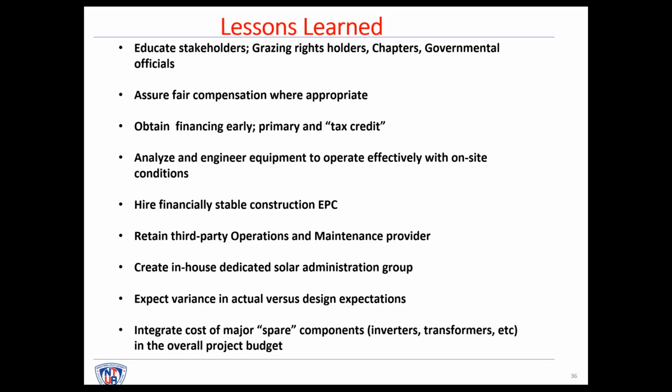Analyze and engineer the equipment to operate effectively with on-site conditions. Again, we learned a very difficult lesson in Kayenta. Given the dust conditions, the inverters were not built particularly to recognize the amount of dust, and we've had issues with that. I won't go into lots of detail, but that's a very, very important piece.